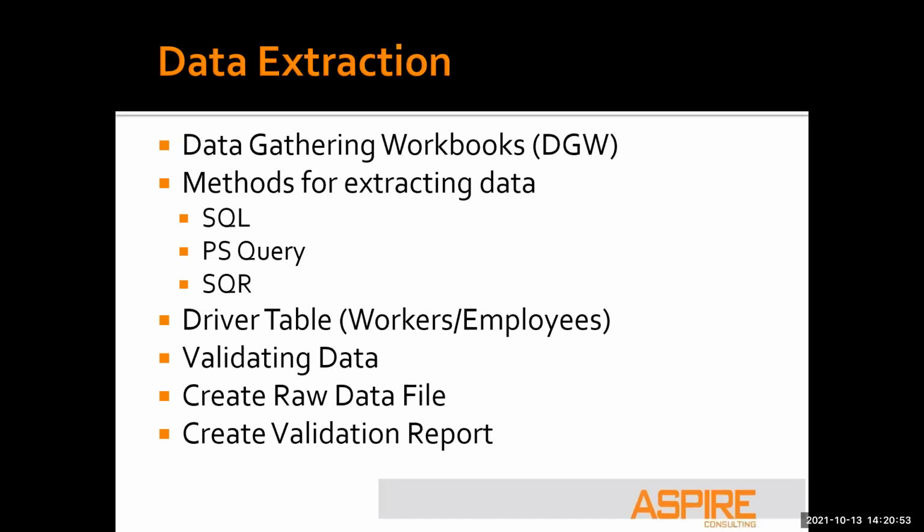So you can do some very basic validation as you're pulling data out that, presuming that it's going to be a technical team that does that extract, you can share with your functional team, your business folks, and make sure that they understand, hey, there's going to need to be some either data cleanup, or maybe we need to start populating some fields in PeopleSoft before we do this conversion. So there's a validation process built into that extract as well, just to make sure that the data that you're pulling is going to be data that can make its way through to Workday.